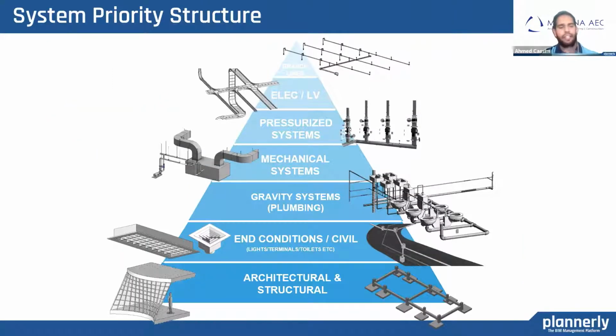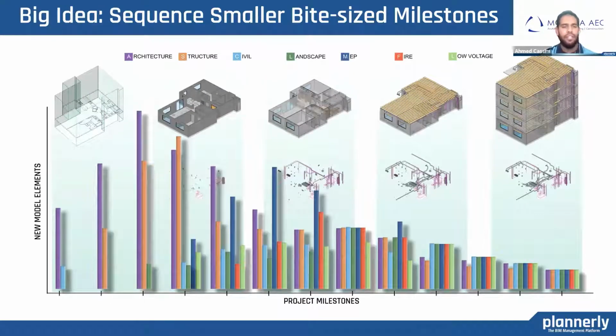So there we go. That was the slide. All right. And so having to make sure that not everybody starts at the same time, but rather, as you can see, in these smaller bite-sized parts of the workflow, as we planned out the milestones and the phases of the project, we can start the teams at the right time and have their work always in the right place, rather than having that loop of going back and doing rework because it hasn't been planned as a sequence.